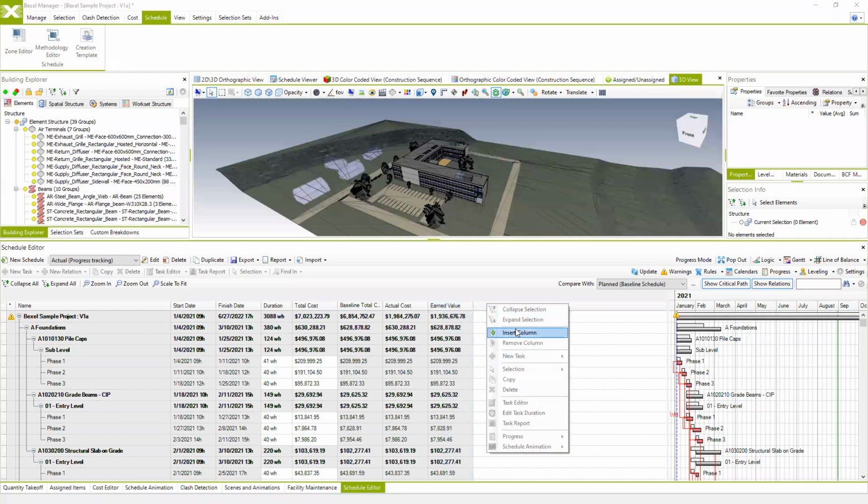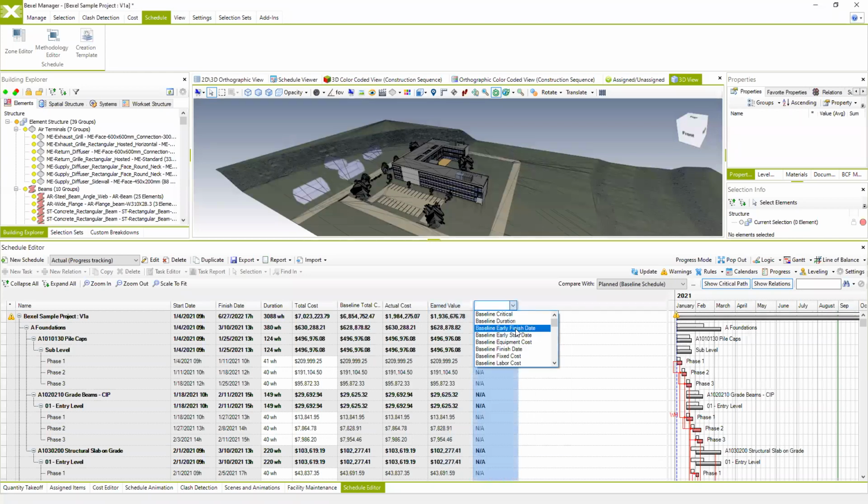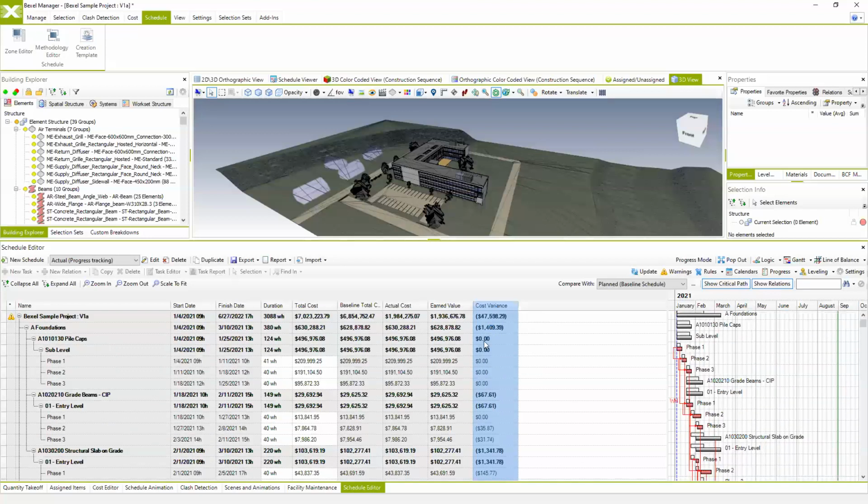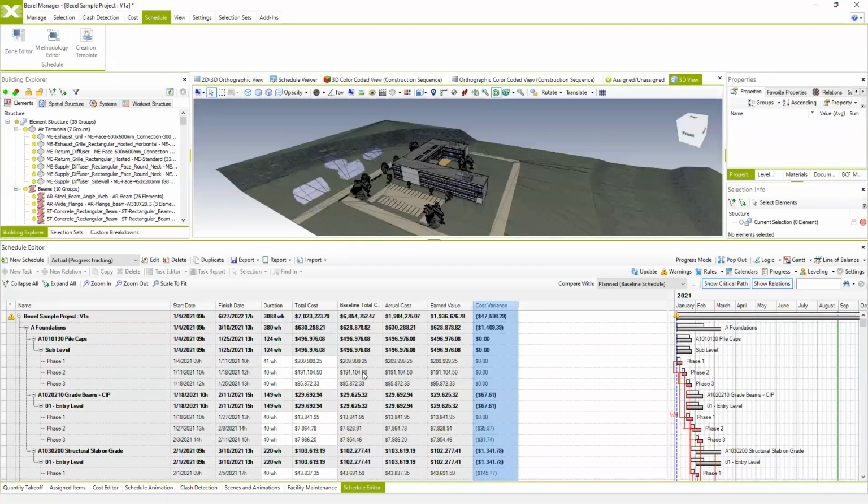And let me just include an additional column, which is also available. It's cost variance. So here we can check where we are. Do we have some benefits for each task or not? Which are our expenses or the benefits from the executed works in this period of time? And of course, I can include an additional column related to the percentage.